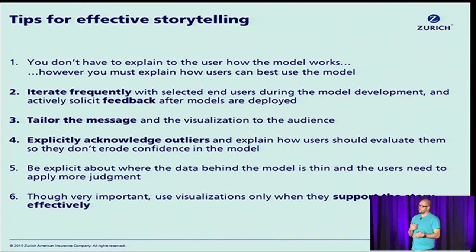but getting that buy-in from them also helps find false starts early on, right? You can build a model. Great example, we were building a model on pricing. My team finished their algorithm, took it out, had already started building the production code, and one of the end users they were talking to said, those two variables aren't available until after we've bound the account, right? So they are great predictors. They're just not available when you're trying to price. So that's something that we could have found out 6 months earlier if they were part of the process.